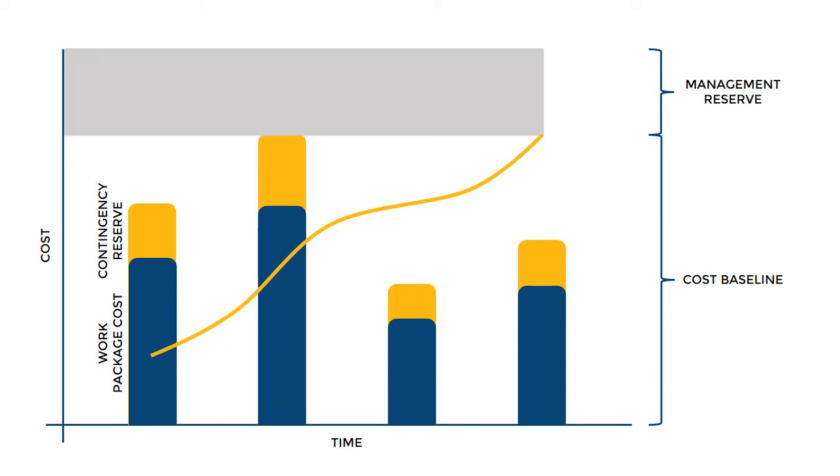The project manager has the complete authority to use the contingency reserves throughout the project life cycle. But in order to use the management reserves, there should be an approval from the senior management of the project, for example, the project sponsor or the CEO of the company.